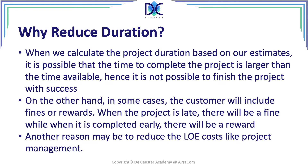Another reason why it can be interesting to reduce the duration of the project is to reduce the level of effort costs. Level of effort costs, like project management, start at the beginning of the project and finish at the end. When we reduce the duration, the project management team does not have to stay on the project — we can release them and we don't have to pay them anymore.